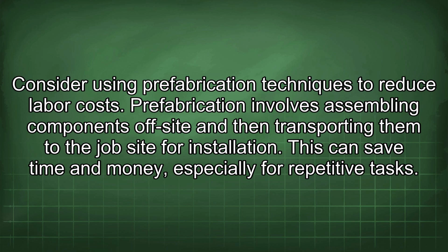Consider using prefabrication techniques to reduce labor costs. Prefabrication involves assembling components off-site and then transporting them to the job site for installation. This can save time and money, especially for repetitive tasks.